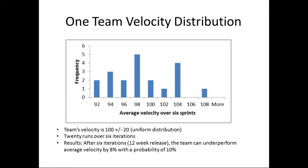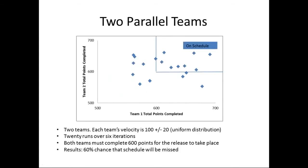That's just for a single team. Things become much more interesting and complicated with multiple teams. Here we have two parallel teams, both with a velocity of 100 plus or minus 20, and both teams need to complete 600 points for the release to take place. The standard approach would say we're going to finish 600 points. But Monte Carlo shows there's actually a 60% chance that the schedule will be missed.